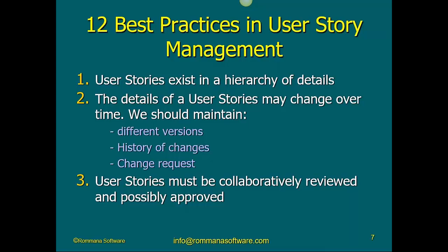But that user story is standalone. It's out of context completely. We should not be dealing with it by itself. We need to be dealing with it as part of the larger user story. So it is my experience that when a user story changes, I don't want to create another user story, but I want to create another version of the user story. When anything changes in our life, we create another version. Why are we stopping this when it comes to user stories?